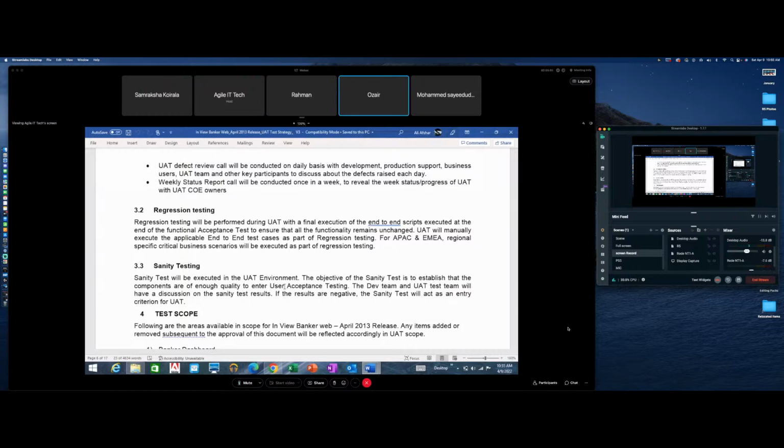No, how are you going to do 5,000 in a week? How many weeks do you have, guys? You have 6 weeks to perform 6,000 test cases. So how many per week? Simple math, man. 6,000 divided by 6. 1,000 per week. Why is everybody struggling so much?